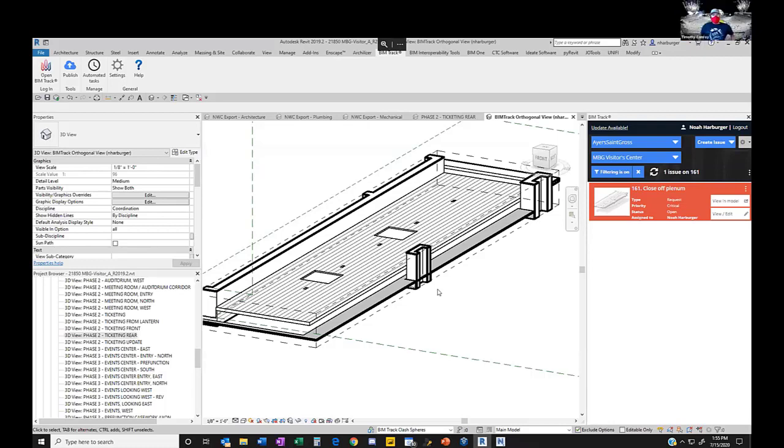We're starting this process at maybe 75% DDs and just doing a run, and then maybe two more times some big pushes during the construction document moments until we see that there isn't anything there.